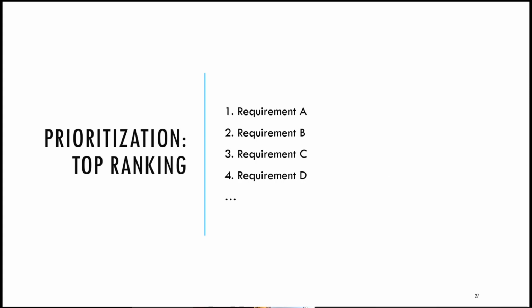When I worked with Scrum, this was the way to go to prioritize. Every requirement has a set prioritization, and doesn't share it with another requirement. One is the most important, there cannot be a second most important. It makes life really easy for the programmers because they really know what to do in which order. There's no more discussion because the prioritization order is clear.